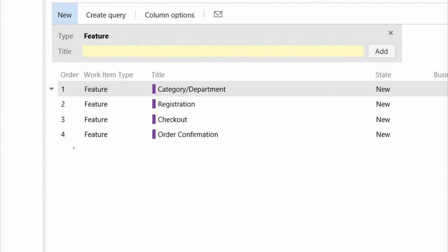In the back, there was a question. So the question is, are they local fields that we brought over, or were they enterprise fields? And the answer is, if you're on-premise, you can do both. If you're using just the client, only connected to TFS without the server, you can map either. The only piece that's missing is synchronizing Project Server Online enterprise fields, which we're going to talk about here in a minute.